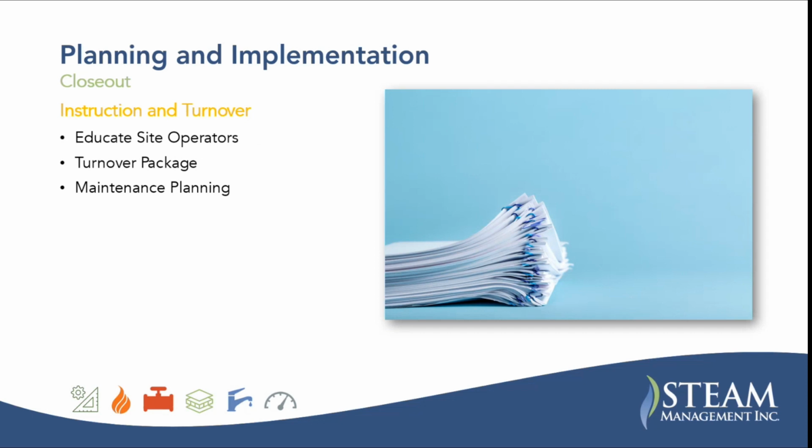Close out, instruction and turnover. Basically, you're going to educate the site operators. You're going to submit a turnover package, or at least operating manuals and things. I always refer to that as a turnover package. And then, as the end user, you're going to plan for maintenance, even if you outsource that.